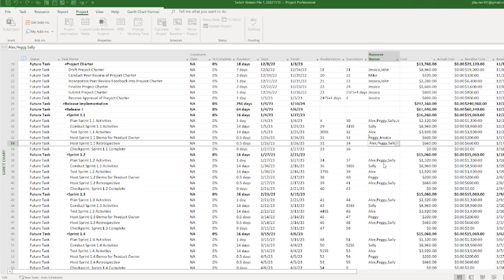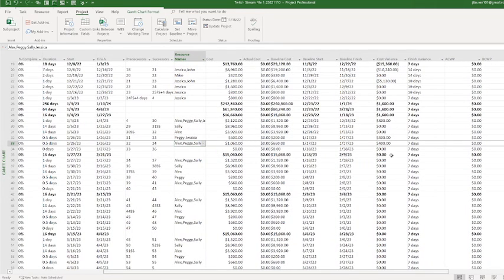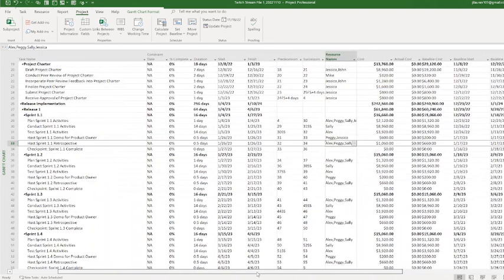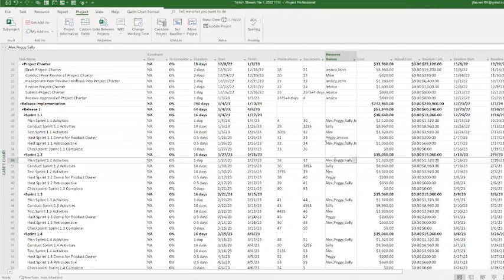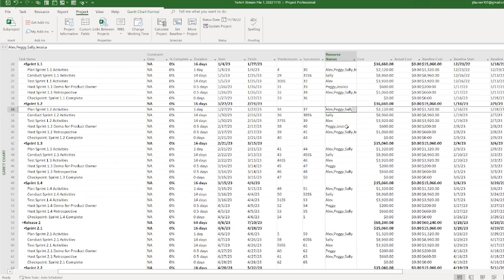And then you're going to see we're going to control paste. So as you see, all the costs have adjusted. So of course our variance should have also kind of adjusted. Yeah, as you see, we're getting a cost variance that's increased because we're already past our baseline. So, and you're going to see that repeated everywhere else. And as you see, I'm not copying everything. I'm just copying the resources because that cost column is automated, so it's going to automatically do that for me.